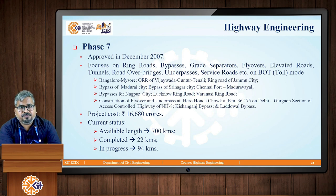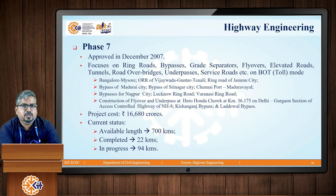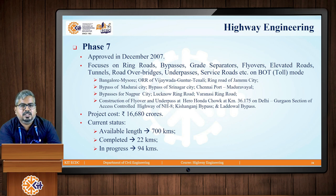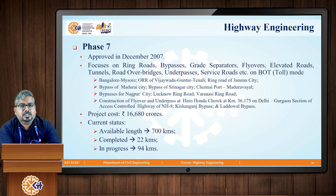Phase 7 was approved in December 2007. The main focus was on ring roads, bypasses, road over bridges, underpasses, service roads, etc., based on the BOT mode. Examples include the Bangalore-Mysore road, bypass of Madurai city, bypass of Nagpur city, and various other road stretches. The estimated project cost was rupees 16,680 crores. The current status shows the available length is 700 kilometers, out of which 22 kilometers have already been completed, while work in progress covers 94 kilometers.